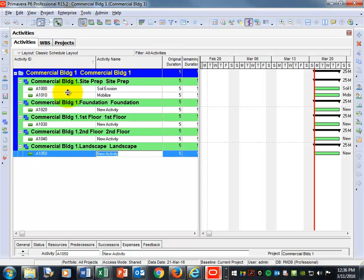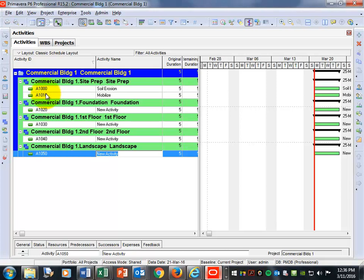Do the same thing for First Floor — click on it and add activities, and that yellow disappears. Then move on to Second Floor, add those activities, and finally go to Landscape. All the yellow placeholders will be gone. Make sure you do all the activities for Site Prep first, then go to Foundation, do all Foundation activities, then First Floor, and so on.